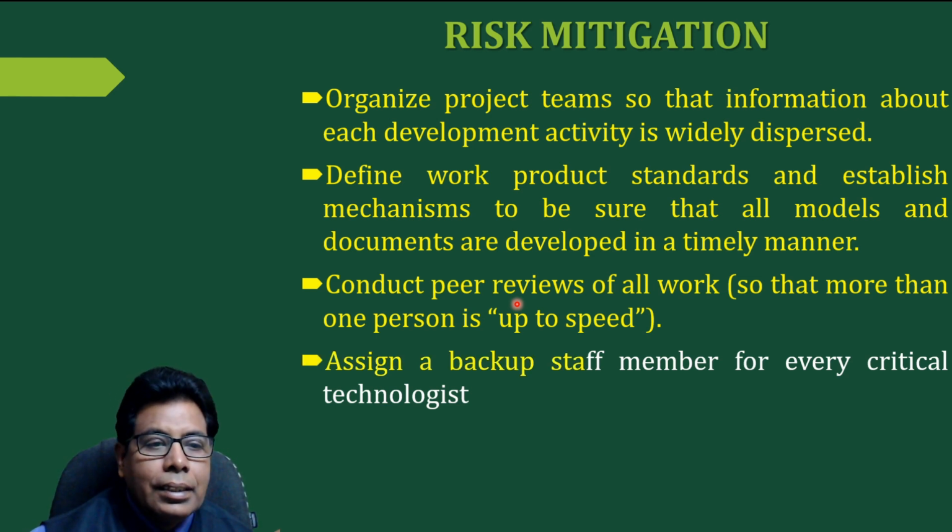Then lastly, assign a backup staff member for every critical technology. So as far as possible, we should include a backup staff member for critical technologies so that even if the staff member leaves, the project will continue.